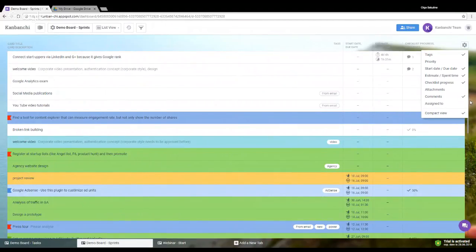Every organization has its own KPIs that they monitor regularly. There is one indicator widely used across different organizations. It's project schedule variance. It's calculated by subtracting actual completion time of a project or task from planned completion time. As you might know, this indicator should ideally equal or be more than 0. Though probably many people don't name it as PSV, they still care about projects being completed on time.